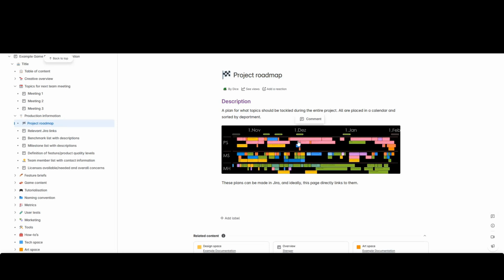So even if you have that buffer zone and you require two more weeks on something, you should still think about what else you can remove, because the buffer is not there so that you can now build into the buffer. It's more there so that if it's necessary, you can go into the buffer.